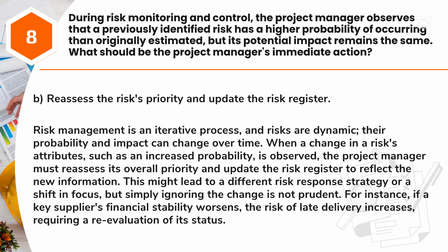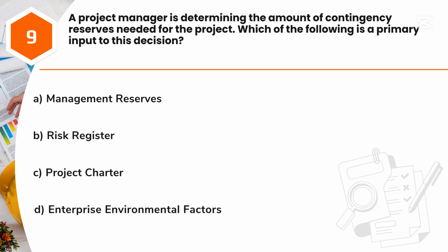This might lead to a different risk response strategy or a shift in focus, but simply ignoring the change is not prudent. For instance, if a key supplier's financial stability worsens, the risk of late delivery increases, requiring a re-evaluation of its status.